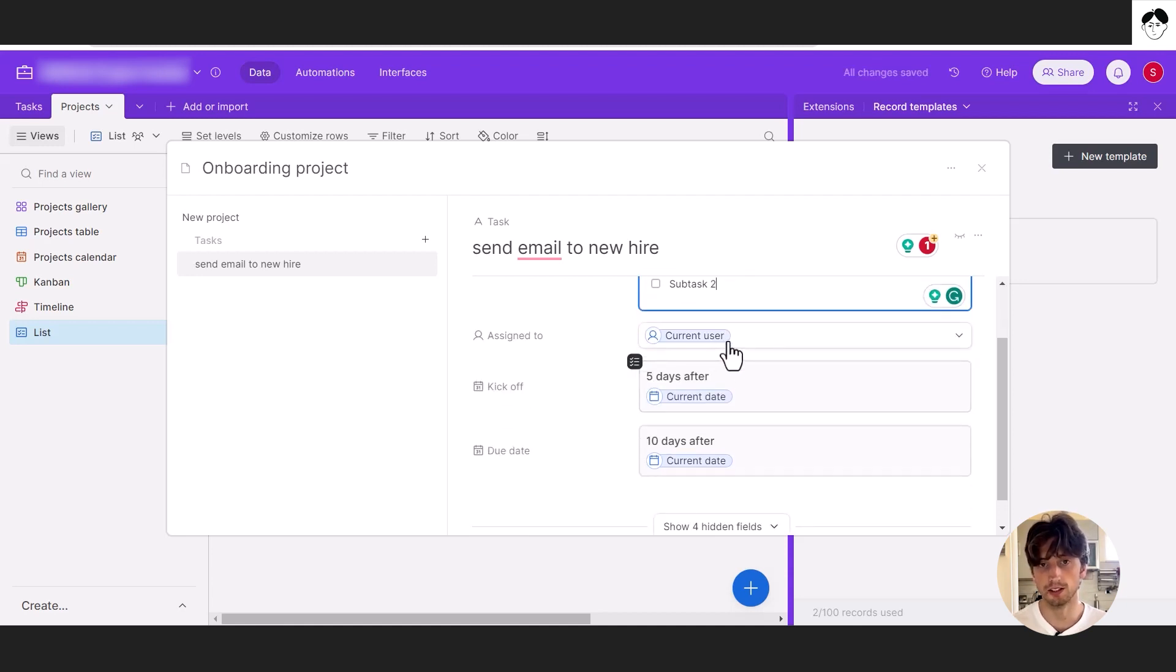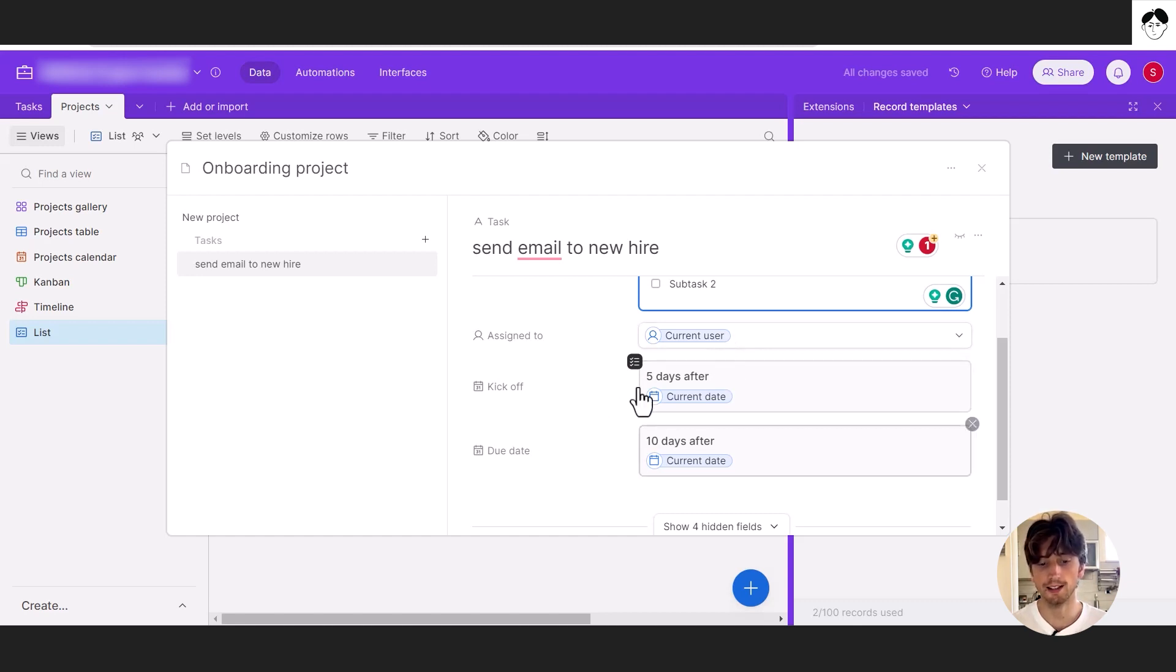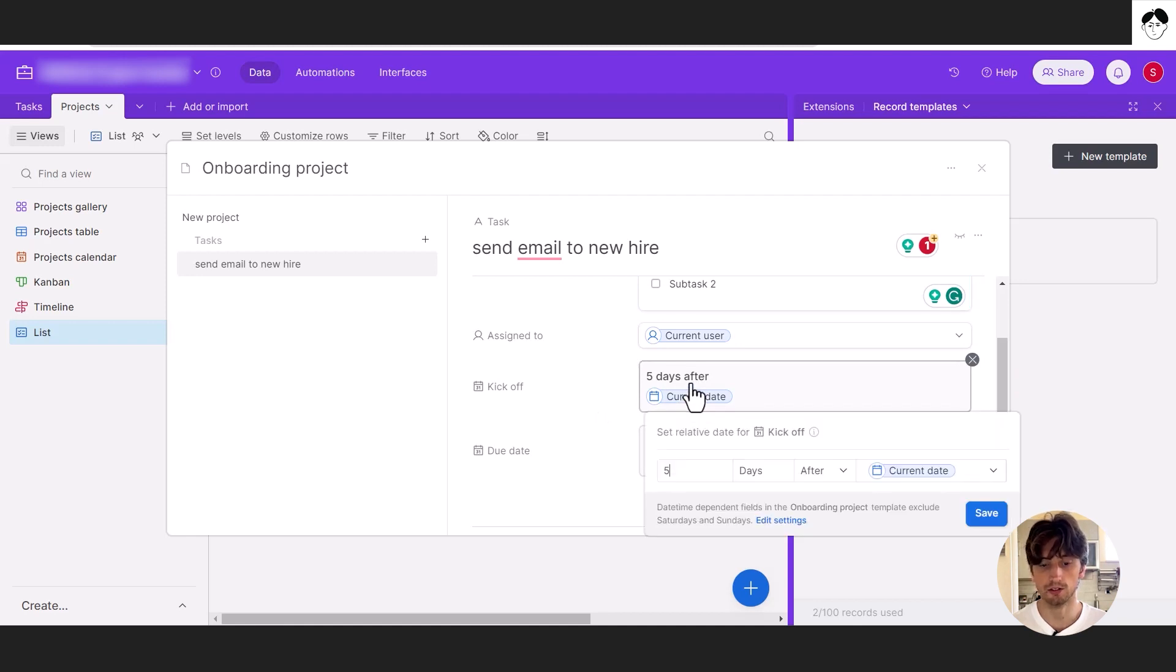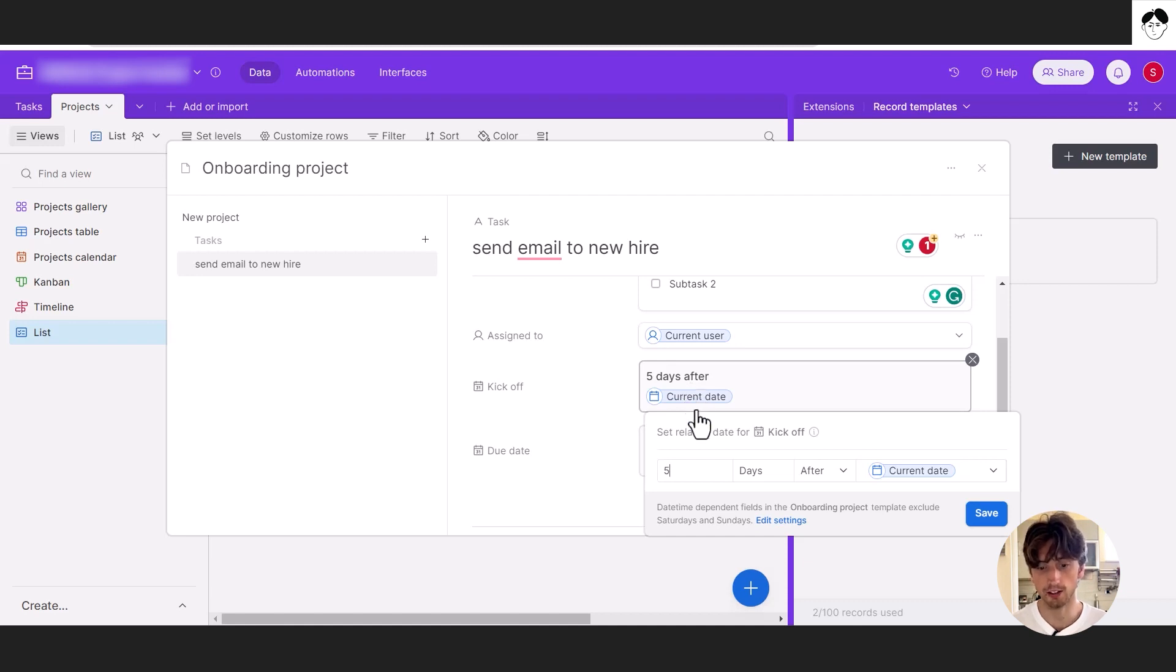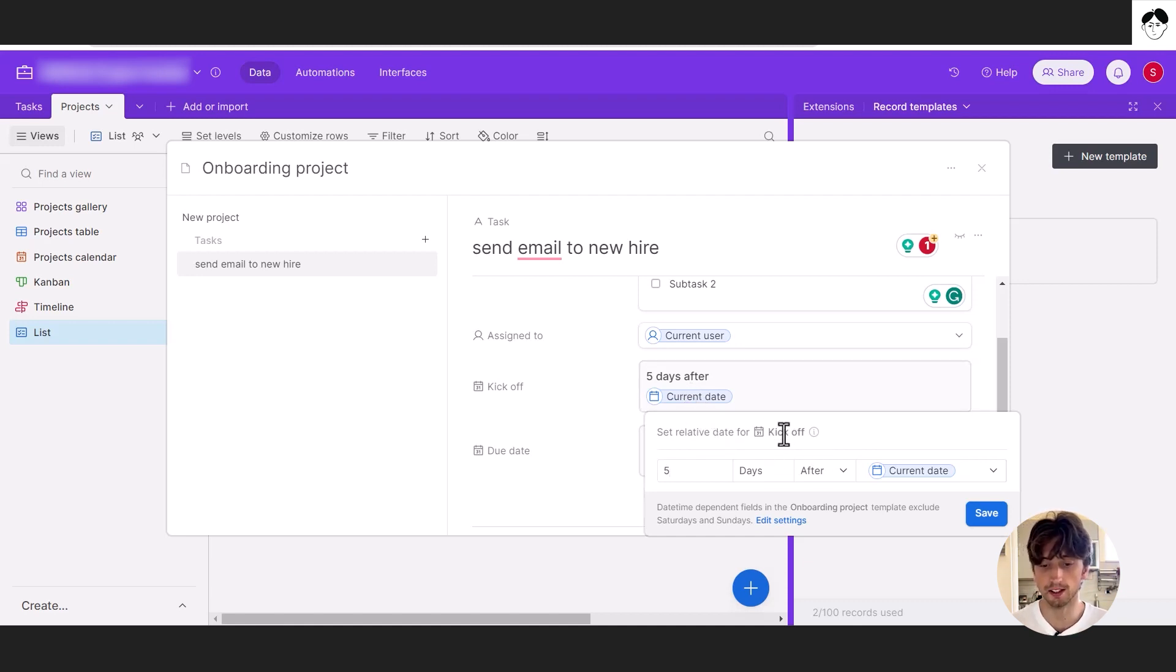Assign to, you can select current user or a predefined user in our table. And the kickoff can be five days after the current date. So that's a dynamic date here that you can set up for children records instead. As you can see here, we can set a relative date for the kickoff time. That is five days.